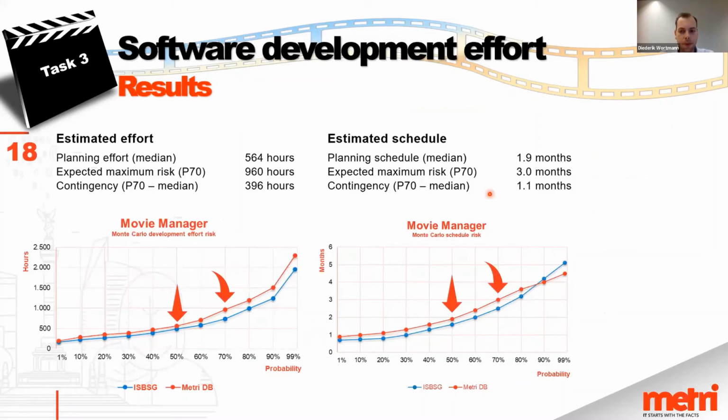So it is important to reiterate what other panelists have already discussed, that cost estimation is actually a probability distribution. And after this probability distribution has been developed, it is a choice which percentile, which is a choice along this x-axis, is selected to provide a y value to, in the left case, find the number of hours required to develop the software, or in the right case to look for the number of months, so the project lead time.